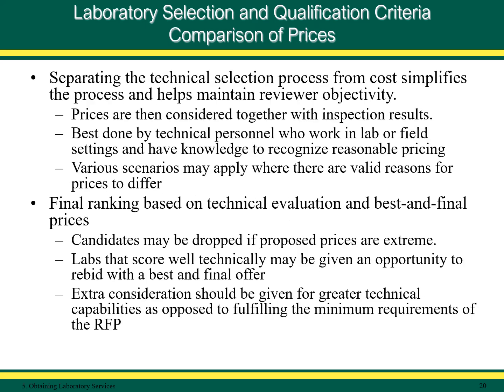Slide 20. Laboratory selection and qualification criteria. Comparison of prices. Keeping the technical selection process separate from cost simplifies the process and helps sustain reviewer objectivity.